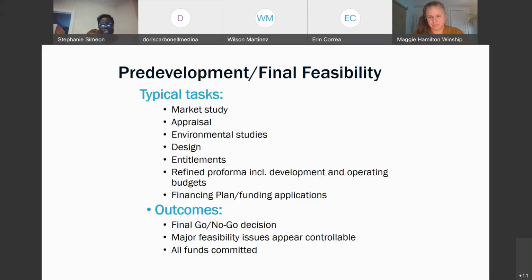And not to say that you just want to do it for the points, but that does give you a way to keep that money in that community. And you definitely want to see, when you're getting your bids, most funding sources require that a certain percentage of your contract goes towards MWBE, even though we're not talking about all of that today.